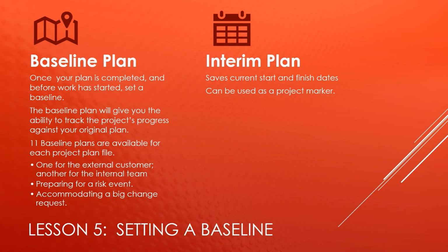So this slide is talking about the baseline plan, and you can set up to 11 baseline plans for each project plan file. Well, that begs the question, why would you need more than one? Well, maybe you want a baseline for your external customer and another one for your internal team that has other tasks on it that you don't necessarily need to share with the external customer.